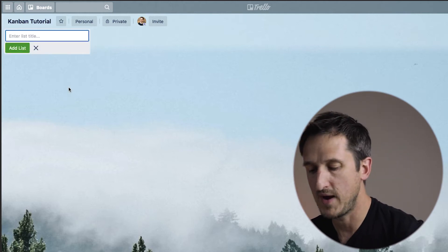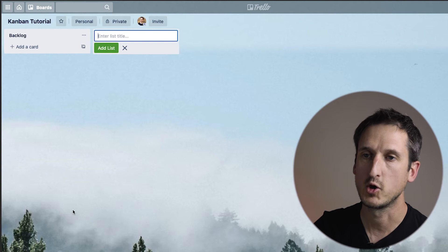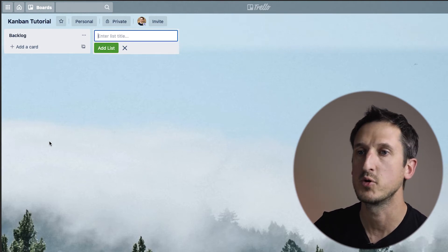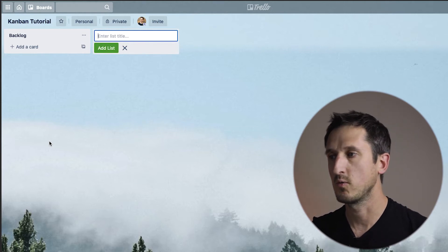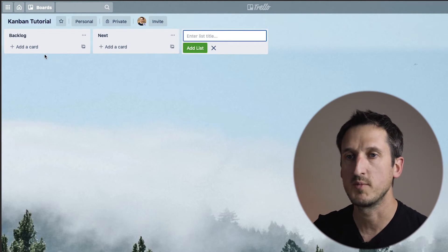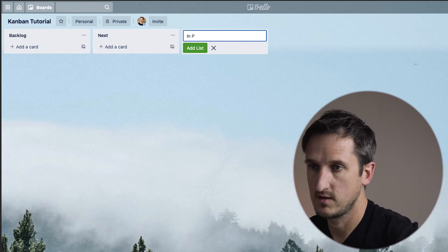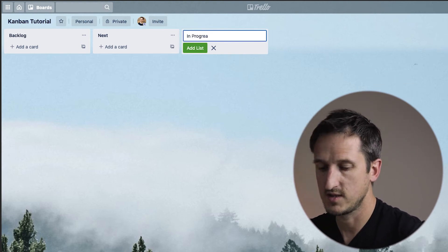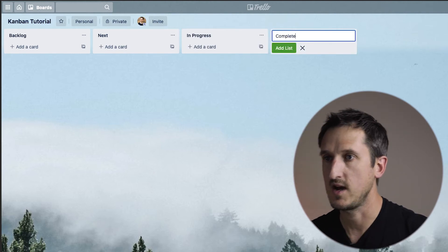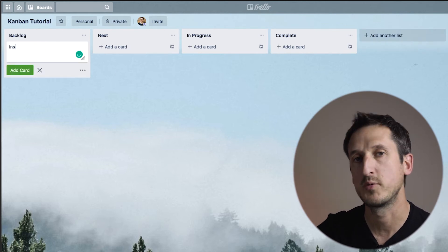The first field we're going to add is Backlog. Backlog is where you'll have all the different jobs — almost like a holding area. This will probably have a lot in it at the very beginning of any project. The next one is Next — this is the job you're going to do next, pulled from Backlog. After that is In Progress, meaning what you are currently working on. And the final one is Complete.